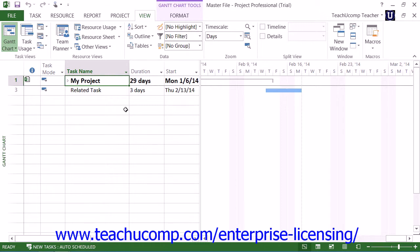For example, the completion of a task within one project can share a finish-to-start relationship with another task in a separate project file. When the first task is completed, the second task in the related project can then commence.